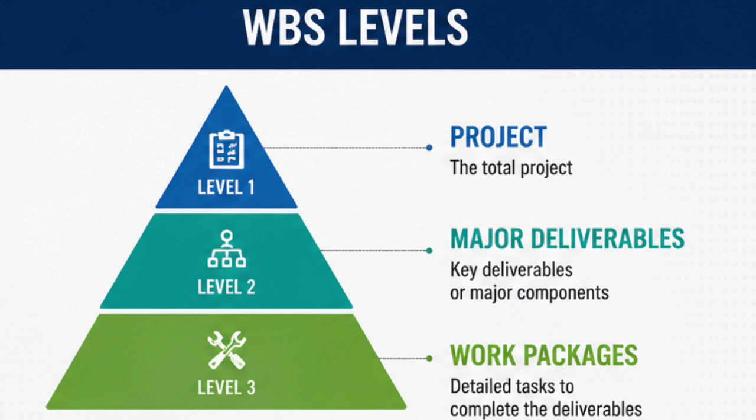So everything will be going under this project management category, project management WBS. Then the next WBS will be like engineering, HSE, quality, or something related to construction. This is also called documentation. For documentation, we may also have engineering. Engineering you can divide based on your discipline, or if it is some product-based thing. Then it will be like basic engineering and detail engineering.